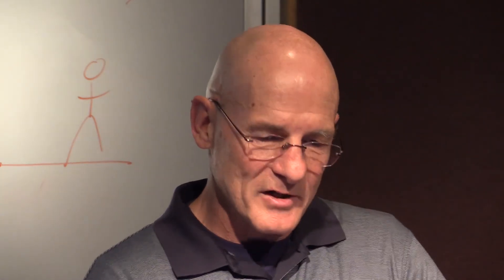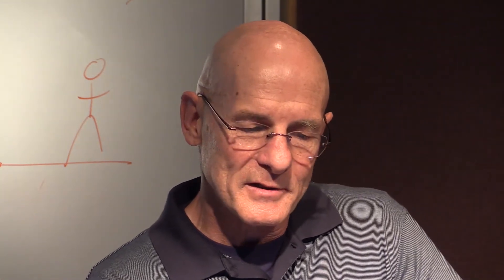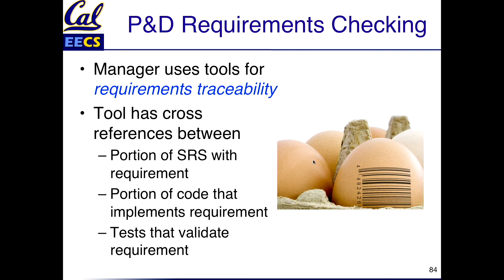But you're not done as project manager — does it actually do what the customer asked? This is called requirements traceability. Tools are developed to tie all the pieces together: the software requirements spec, the piece of code that implements it, and the test that validates it. With these tools you can ask: did we really implement everything the customer asked? If the test is passing, it's handling that piece of the requirement. So all pieces of the hundreds-of-pages document are covered with tests and corresponding code in the SRS.